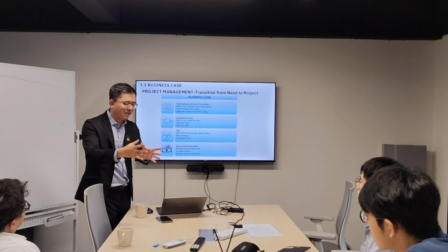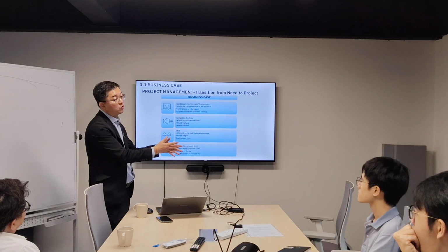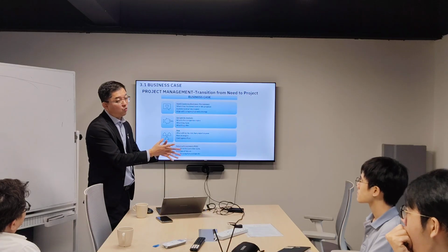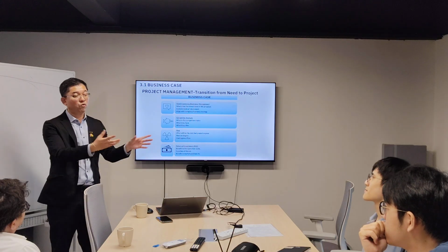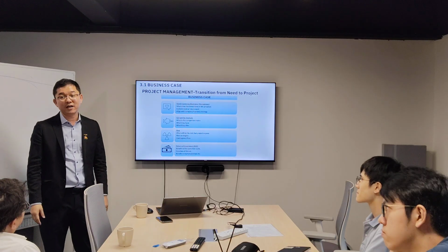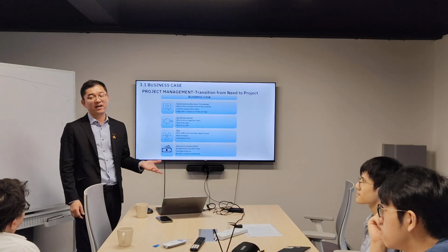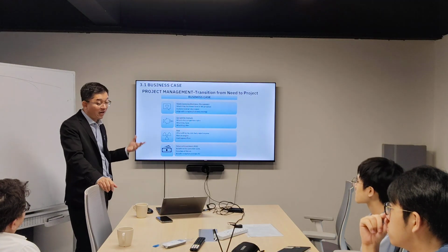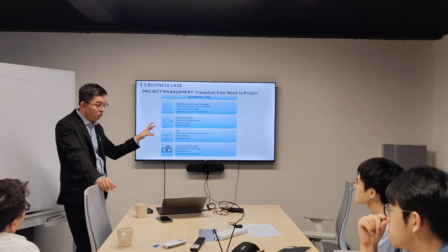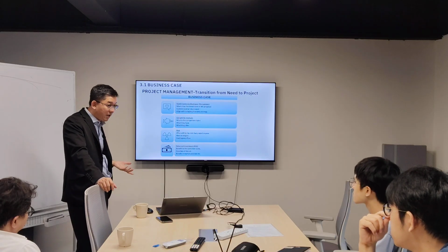They build a Soho, maybe let's say 450 square feet. Then you build with 300,000, and you build a Soho with 500 square feet with 300,000. If you are the purchaser, which project do you want to buy? Definitely 500 square feet, right? So you need to know who your competitors are and what they offer, so you can plan ahead on your selling price.